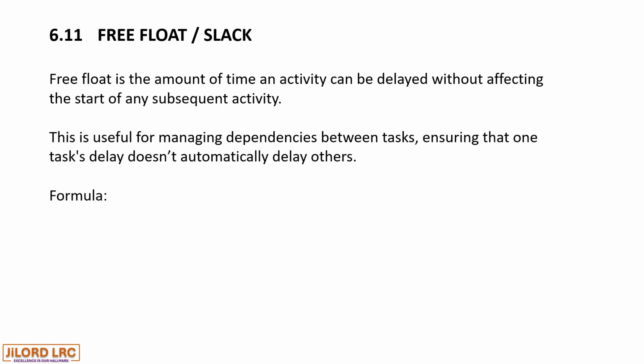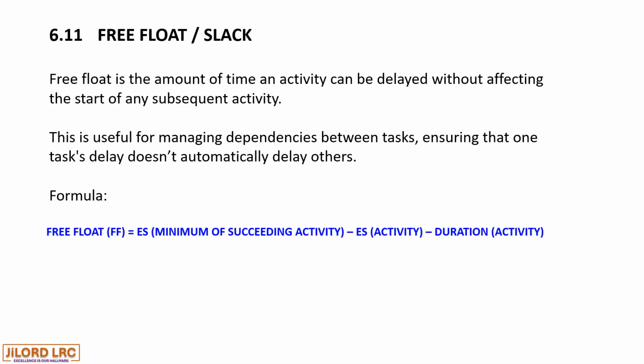Formula. Free float equals early start, that is the minimum of the succeeding activities, minus early start of the activity, minus the duration. We will look at examples in our subsequent lesson. So the free float is the early start of the minimum succeeding activity minus the early start of the activity minus the duration.